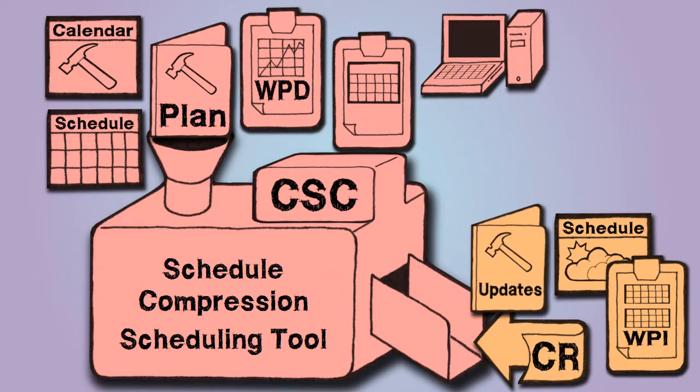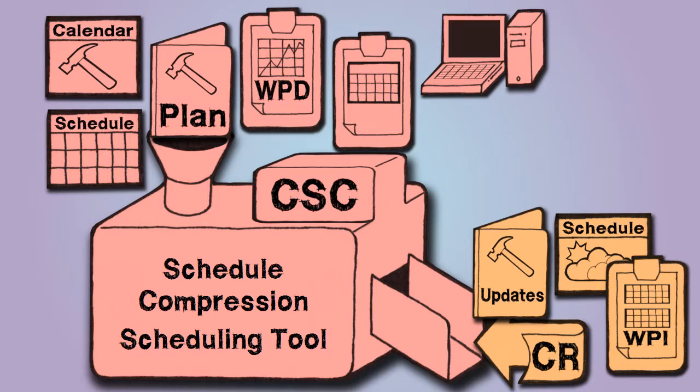Project management plan updates include any changes in the schedule baseline, the schedule management plan, and the cost baseline. Remember, time and cost are tightly linked. Any changes to the schedule will undoubtedly affect the project cost and vice versa. If variances are found, project document updates that integrate the new schedule data into the project schedule network diagrams are based on the corrective actions taken or planned.